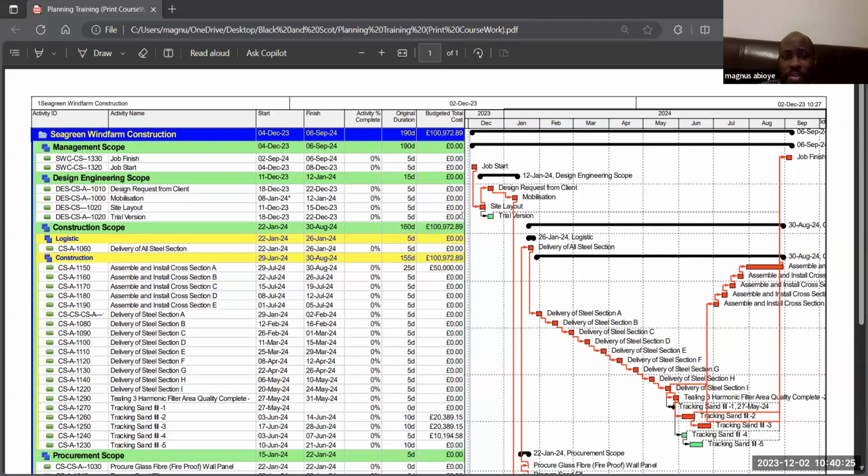It's all included. Critical part, if you want me to show just the critical part or the client requires just the critical part, that's when we start using other tools called the filter, which I didn't show. I was even intending to talk about filters, group and sort, but I don't think we can jump into that. So it would have just been only the ones with red, and that would just be the critical part.